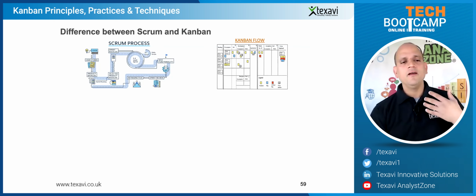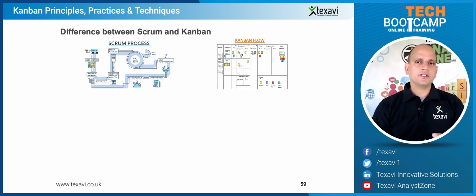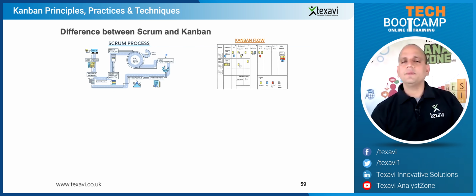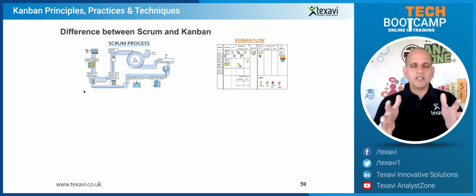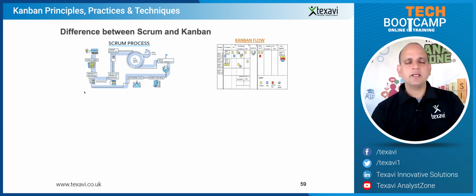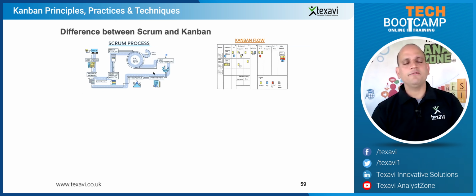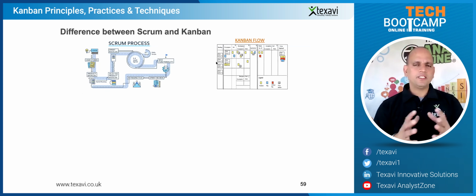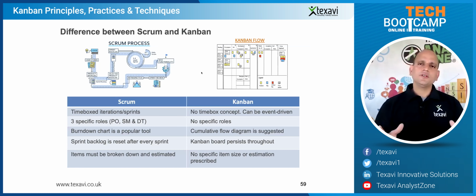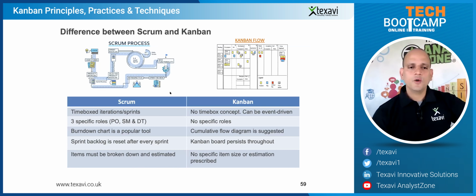And then you've got the 3 roles there: the product owner, Scrum master, and the Scrum development team. You have to have the structure like that, otherwise you can't say you're still following Scrum. It's not accepted. So Scrum is flexible, but at the same time, it is a bit watertight. It's still prescriptive about the roles, how you call the events, how you structure the plan and arrange the meetings. There is a structure and a method to the madness. Whereas in Kanban, there's no specific role, and no set of structures, templates, or techniques that you need to use.